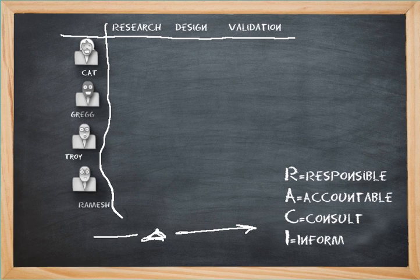At the beginning of a project, Cat's role is one where she is Responsible at the research period, so let's put an R right there. Greg's role at the research period is one of Accountable, and Troy's role is to be Informed, and Ramesh is also Responsible. So actually Ramesh is going to be responsible with Cat in the research phase of a project.